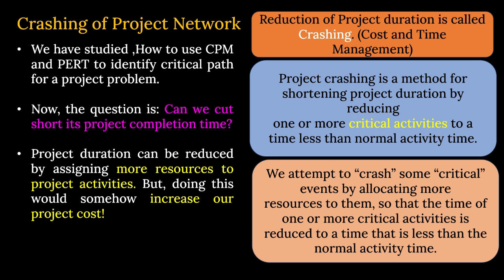We attempt to crash some critical activities by allocating what? More resources to them, so that the time of one or more critical activities is reduced to a time that is less than the normal activity time. So you have to employ more resources on the critical activities, and only then will the project duration be reduced. And that is what we are going to do.